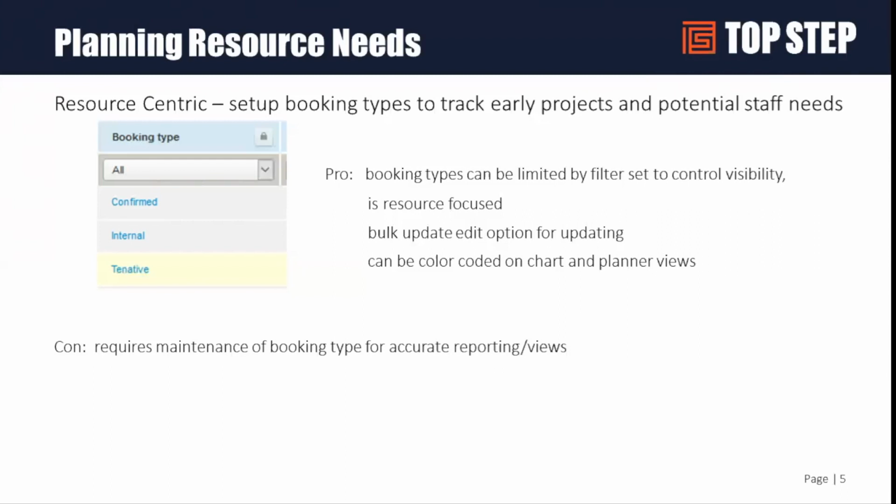I do find that there's one big con with using booking types, and that is they don't take care of themselves. So if you put a bunch of bookings in and they're all tagged as tentative, according to my spelling, those are going to stay that way until somebody comes along and says, oh, wait, the project was signed like 2 months ago. I should probably flip these to confirmed.